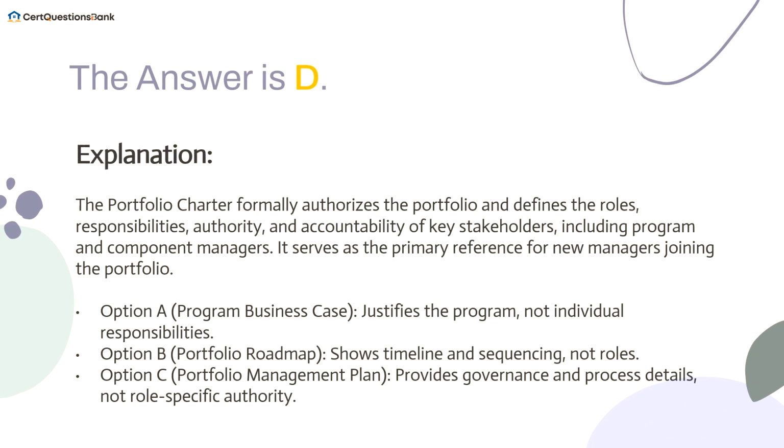The answer is D. The Portfolio Charter formally authorizes the portfolio and defines the roles, responsibilities, authority, and accountability of key stakeholders, including program and component managers. It serves as the primary reference for new managers joining the portfolio.